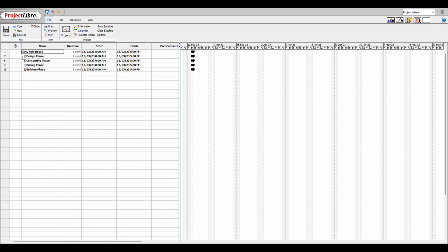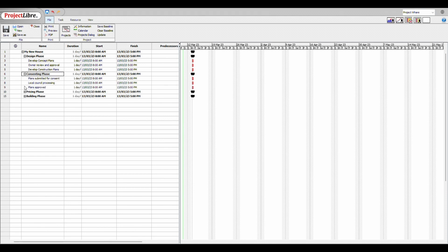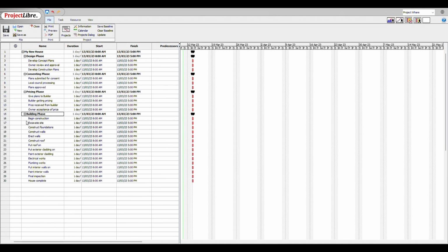So there we are. We have defined the activities using the work breakdown structure that we're going to do on the project. But this isn't a Gantt chart yet. There's nothing over here at all which indicates the total duration of the project, or the critical path or paths through it. So the next thing we want to do is put the duration estimates in for each of these 3rd level activities. These are the only ones we put in. See where it's grayed out slightly?